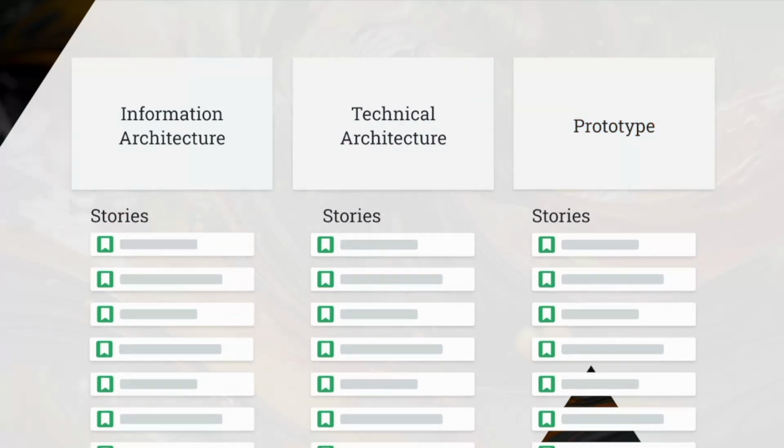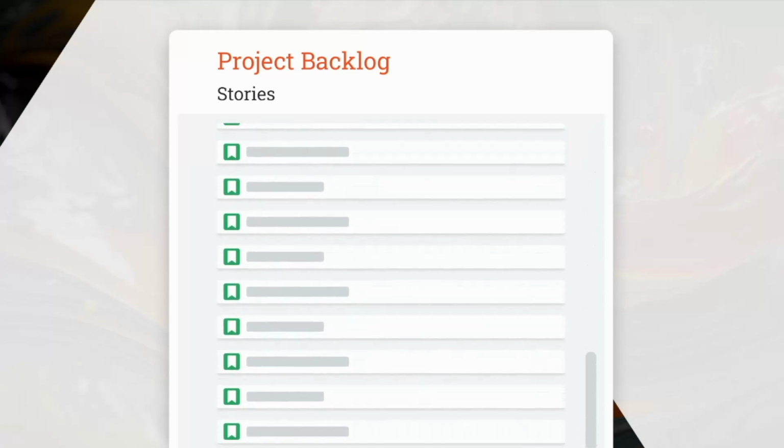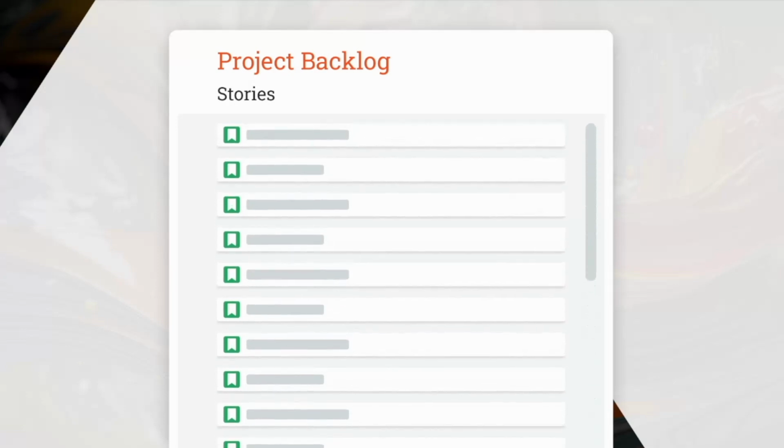These stories make up our issue structure, and when combined, these issues create our project backlog, which represents the design and development plan for the upcoming project. The intent of working with the story format is to identify requirements without dictating a prescribed solution.